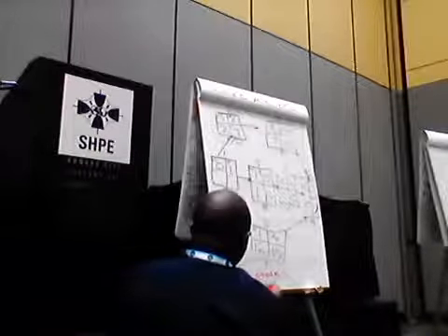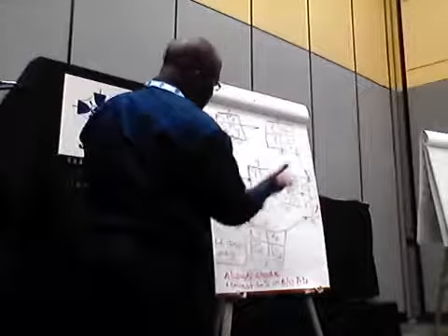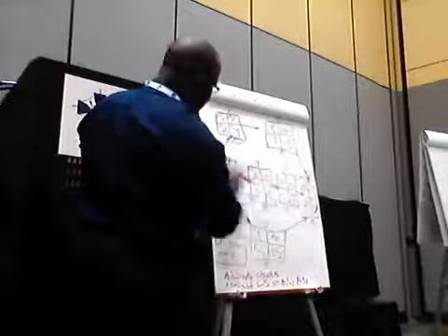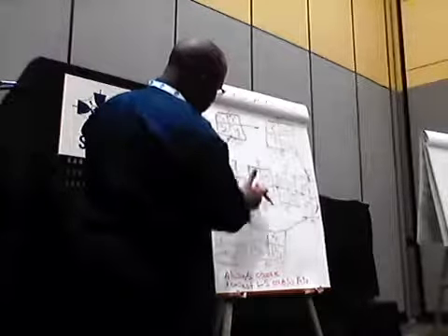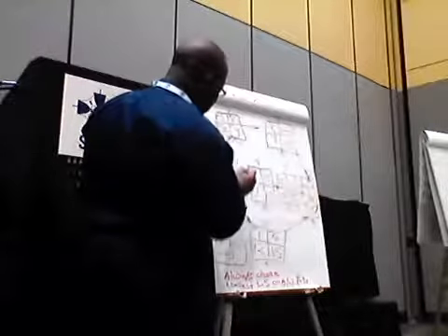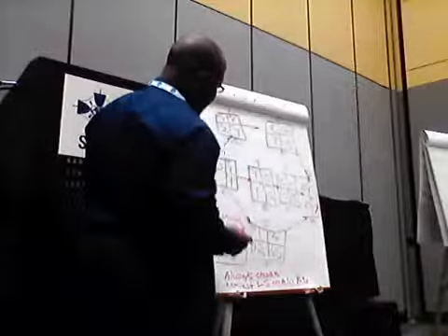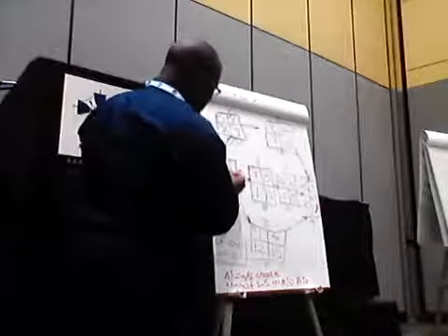I've kind of summarized it here so we can get out of the way of the networkers, but we're going to take the smallest number. Going backwards, which one are you going to take? You've got a 12, that can go here, you've got a 1, or you've got a 2. The smallest number is the 1. Then you're going to subtract 1 minus 1 is 0.